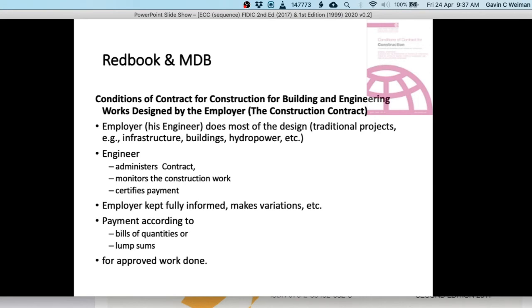If the wording of the consulting contract is he may not act without the consent of his client, then the normal common law relationship between a consultant and the client has been altered by the express agreement or wording of the parties' agreement.